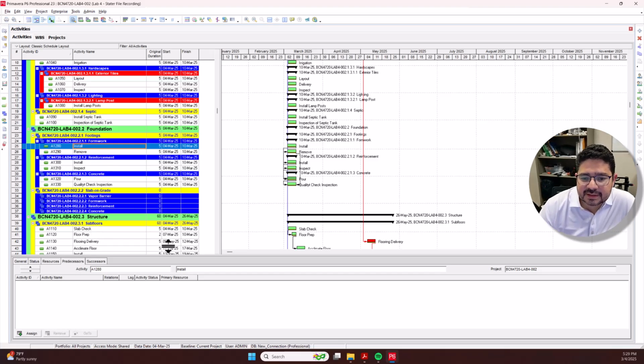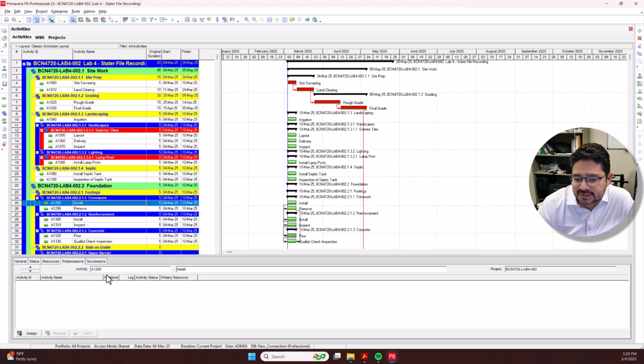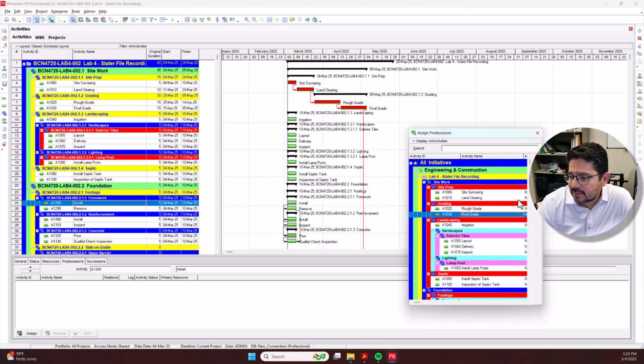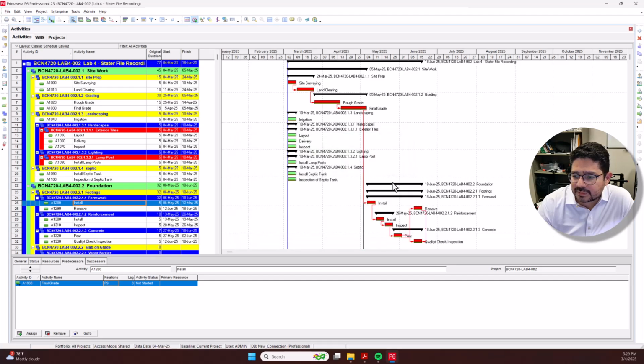Okay, all right, so let's see. I still haven't linked this activity to a predecessor activity. I'm just going to connect it to what I have here with the final grade. So I'm going to add it to the final grade and link it. Now my schedule will look a lot different.